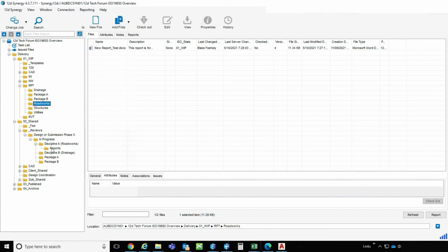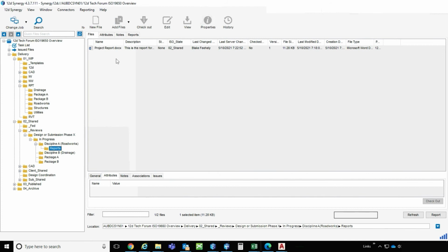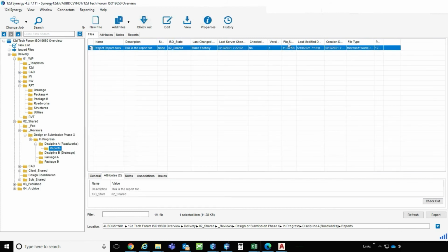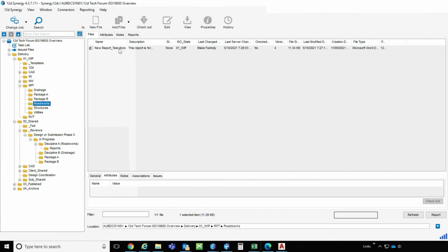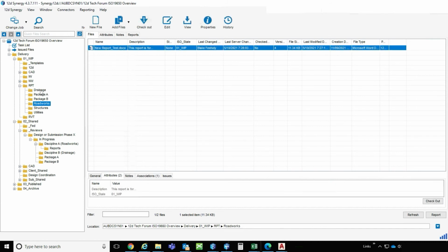Once we've reviewed for the final time the contents of our shared report, bearing in mind that the version and/or revision of this document can increase to whatever number or value, there will be ultimately final changes as a result of this passed back into our work in progress document. And this aligns with the concept that the document in our work in progress container, as you can see from the left-hand side hierarchy, evolves from project commencement to project completion.